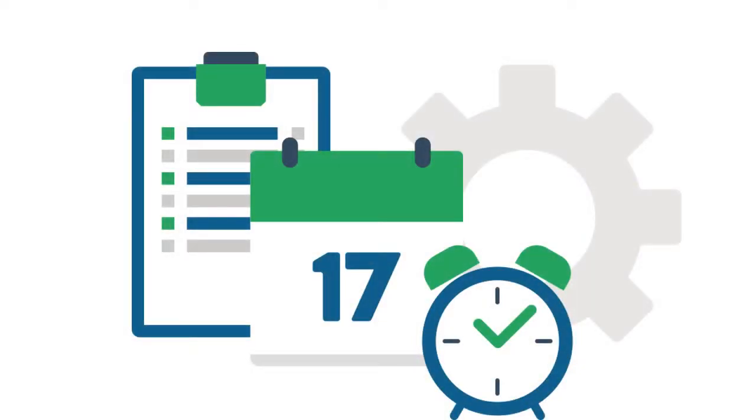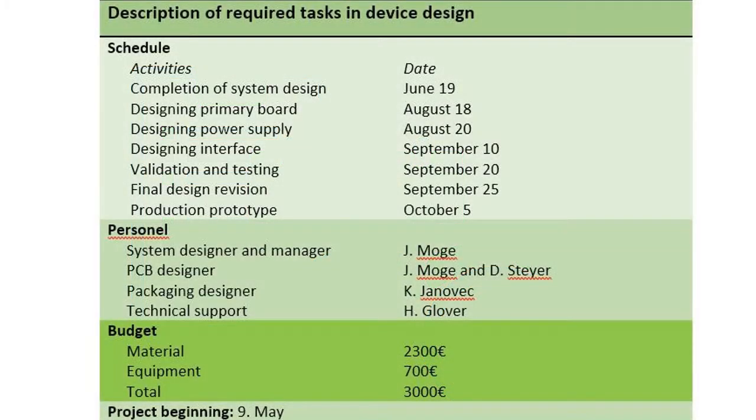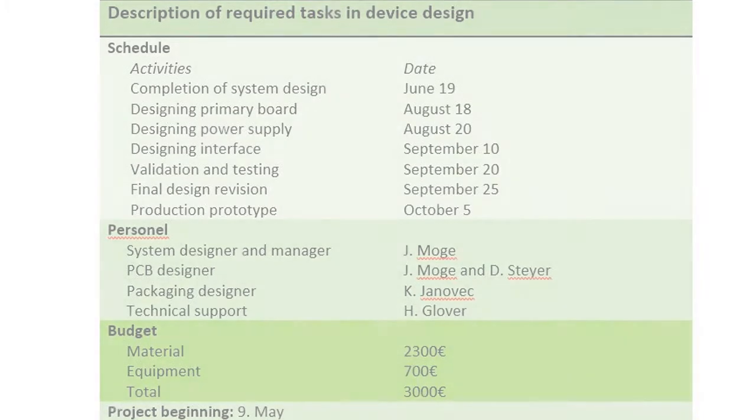Tasks determination. The first step to the determination of the project plan is determination of tasks and work that needs to be finished during device development. Much information on task determination can be found in the block diagram of the new device. The device's block diagram shows the final version of functionality, where all requirements are specified. From this we can develop a project plan.